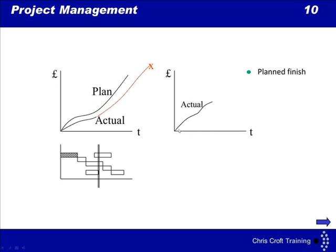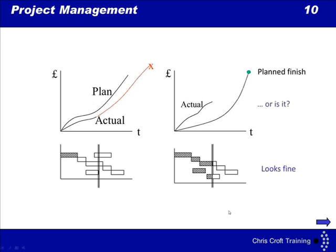What about this one here? This is our actual spend so far. And that's the planned finish point. So it's the finished date and the finished budget. This one looks okay. So rule number one, have a look at the Gantt chart. Now suppose the Gantt chart looks like that. That's fine. We're keeping up with the now line. Everything seems to be fine. It does look fine. But is it?